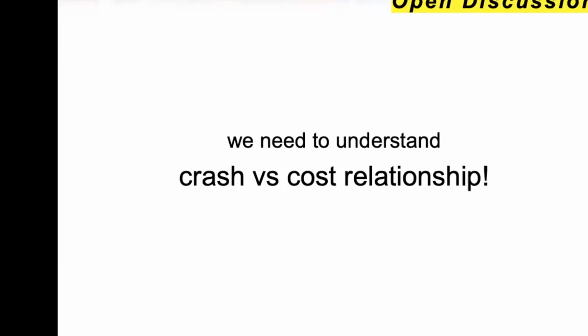And maybe for some activities, completing them early will cost a lot more money. If you want to complete them earlier, some of them will require a lot of money, while some other activities will not require that much money. So that's where you will advise your CEO, hey, we should start from this activity because of that. Okay.